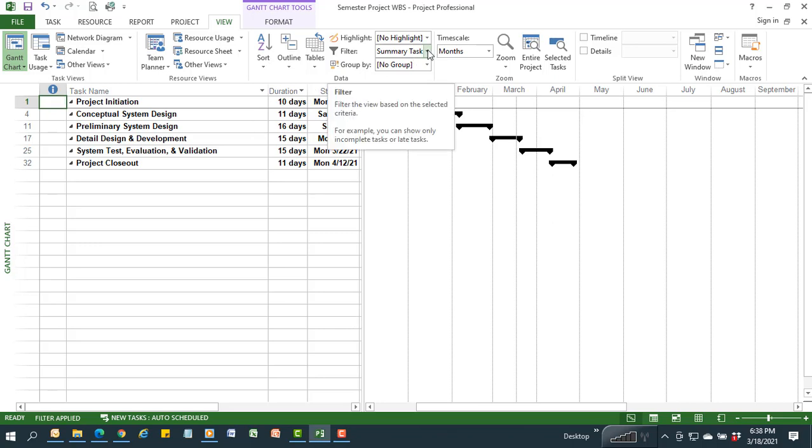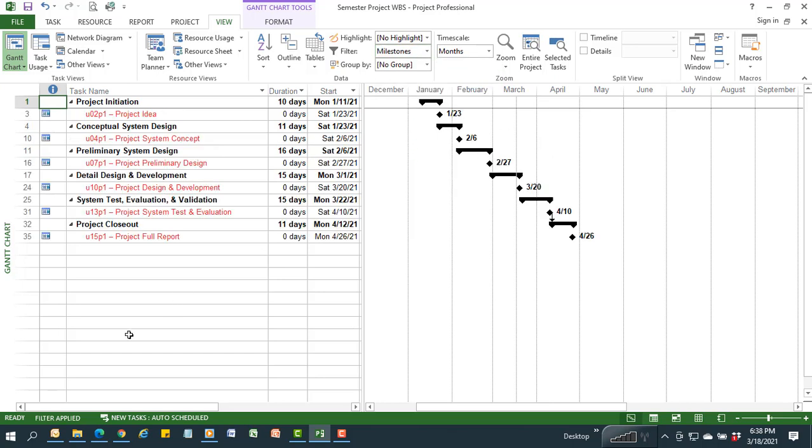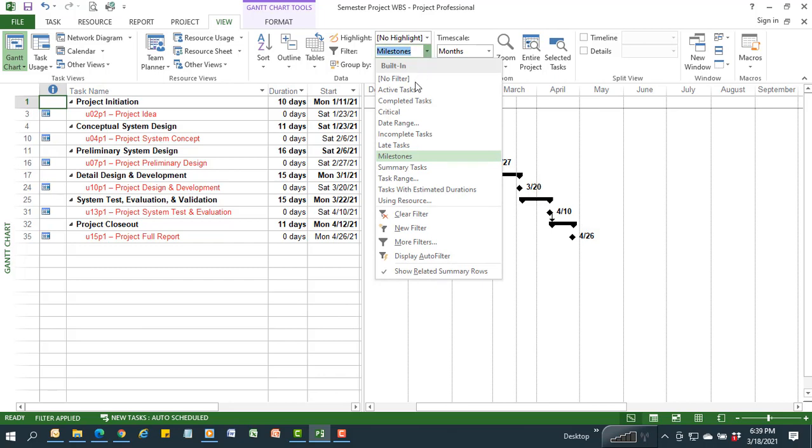So if I open up my tasks to include my milestones, I'll see why those constraints exist. Here are the actual project assignments. The 6 project assignments have to be turned in on the day they happen to be due in this particular spring 2021 semester. So dates will change obviously in the future, but these assignments 2, 4, 7, 10, 13, and 15 are due on these days and they're phase oriented. So that sets a constraint on how much time I can plan into each project phase as I go through. So it makes my project actually quite simple because of that constraint.